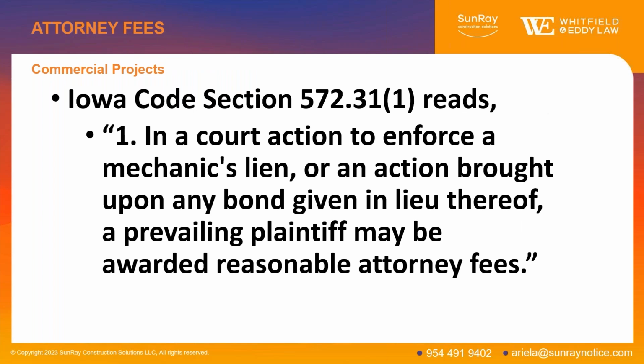Okay, attorney fees. This is always a big topic because you typically have to have an attorney involved if you're going to be going after someone for a lien and file a lawsuit. So the first section of the lien statute that governs attorney fees says, as noted on this slide, the thing to take away here is a prevailing plaintiff. Okay, so this is a one-way provision in favor of a claimant only. So if you're defending a lien claim as a general, for example, defending a sub's lien or an owner defending a lien, and you win, you cannot get attorney fees under the statute. But if you're a claimant, you can.